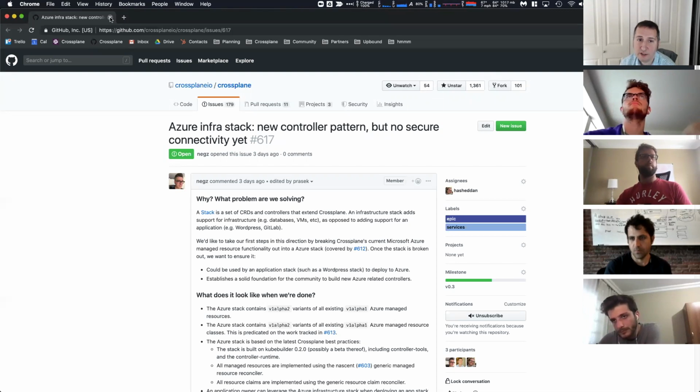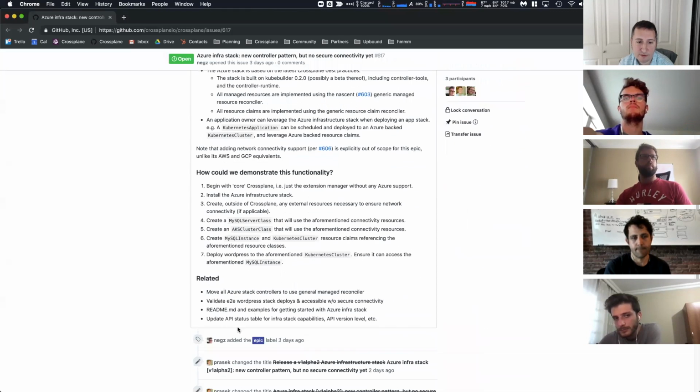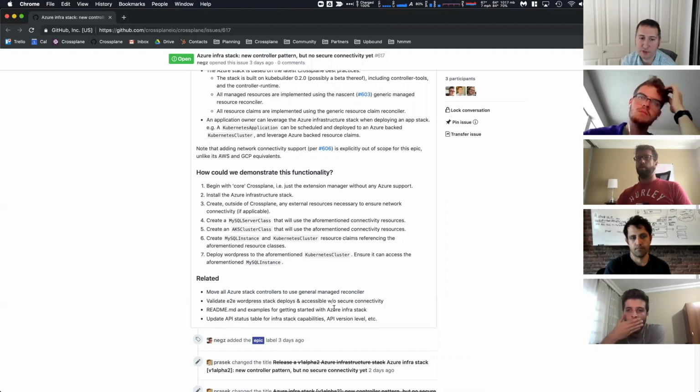Yeah, I mean, we're kind of modeling these as epics and features, so that each related issue here is more at the feature level, or something that is demoable. It's higher level. We're trying to stay away from getting the GitHub issues really cluttered up with a lot of super low level tasks.